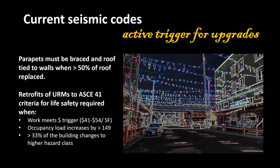It's also true that a pitfall that we found that other jurisdictions might also experience is that we bundle roof permits. So a re-roofing company can pull 10 permits at once and send in the addresses later. And sometimes when they did that in the past, they re-roofed URM buildings and it was inspected and approved before we even knew it.